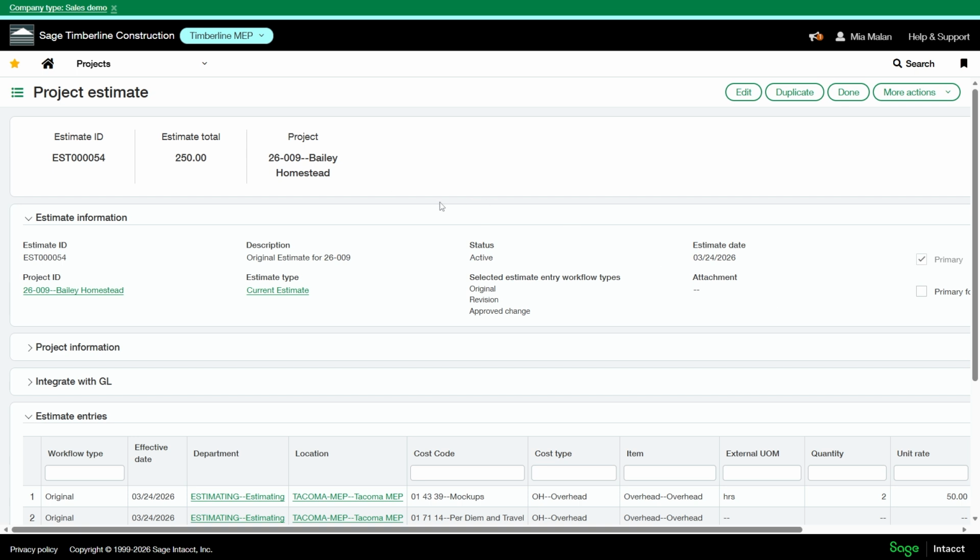You can use accumulation types to roll up the cost type data into meaningful summaries. You can track production units alongside the costs for the productivity on construction projects. And you can feed the estimate data into GL budgets for integrated financial planning. This level of detail gives project managers and financial teams a complete real-time picture of where the project stands financially at every task of work.